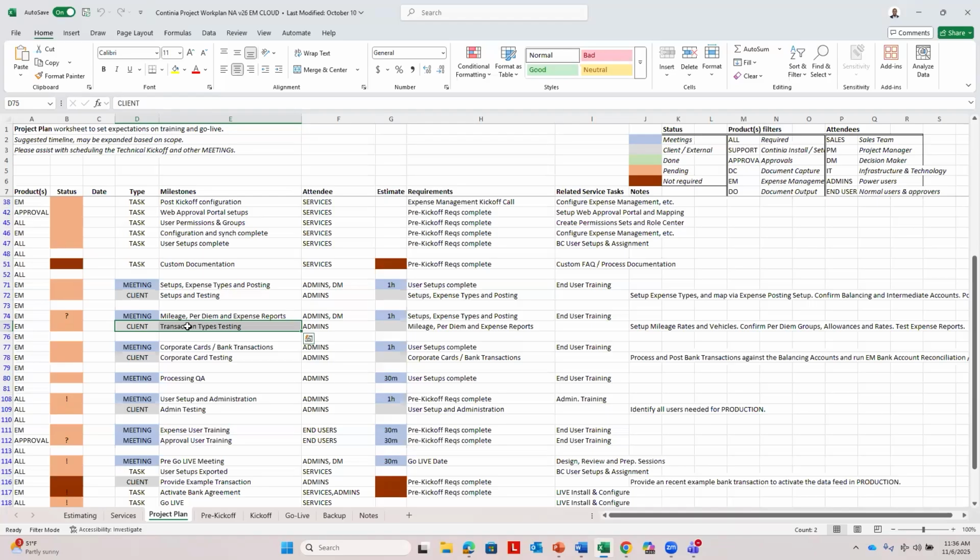And now you get to the go live date and you're forced to go live, and the client is not comfortable because they never tested, they never posted, they never processed expenses. They're not comfortable with taking this solution live because once you're live, you're with real data, you're hosting real life transactions, and it will be very hard to correct mistakes. So it's very, very important that the sandbox phase, the testing phase is fully realized.